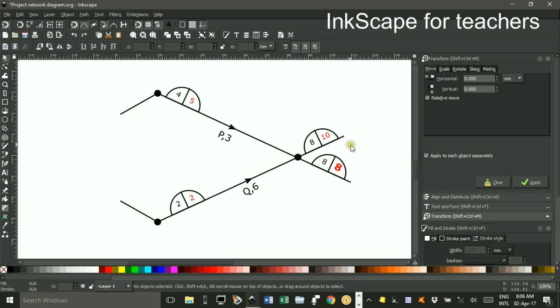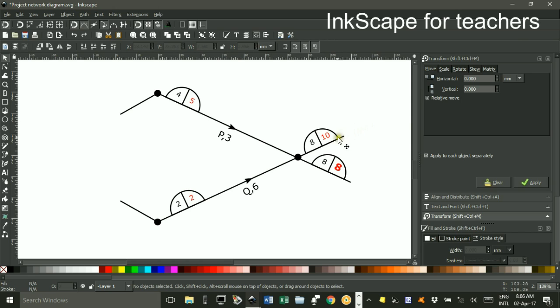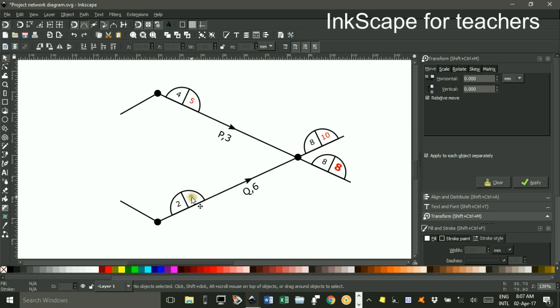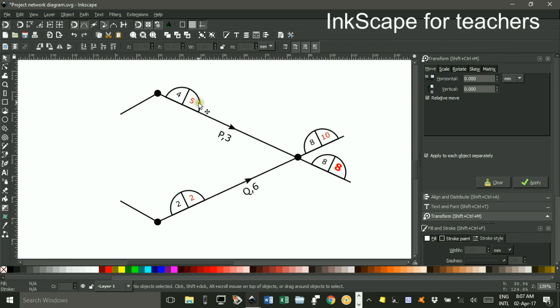Just a quick note what to do if there are two semicircles or boxes at the start of the same node. If we're backtracking or backward scanning, we're looking at the red numbers and subtracting the durations of the previous activities to get to the next red number. If there are two boxes there, we take the smaller of the red numbers. So in this case, 8 is smaller. So we go 8 take 3 to get 5. And the lower path, 8 take 6 to get 2.